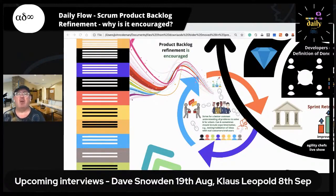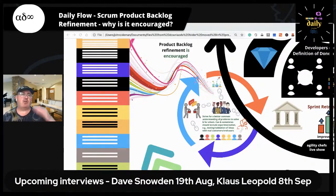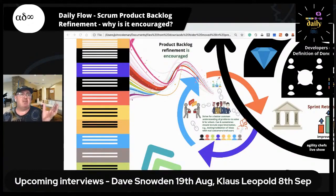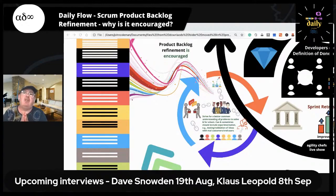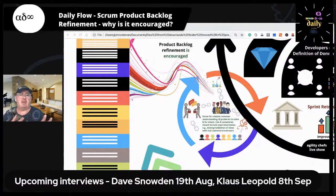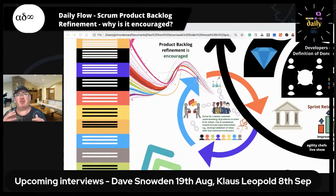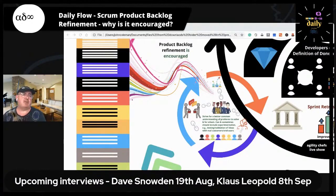What would be some equivalent or close things in Kanban? One optional practice is right-sizing. Right-sizing is where you look at your product backlog — optional in Kanban — and ask: is this elephant-sized? Can we fit this into a sprint, or if you have a service level expectation in Kanban where you finish most work in 16 days or less, does this item feel like it fits within 16 days? If it doesn't, you might need to break it down. Right-sizing is not quite like product backlog refinement, but it's about making sure we're not bringing in elephants. Some discussion does arise, and you might even involve stakeholders, customers, and end users in the same way as product backlog refinement.